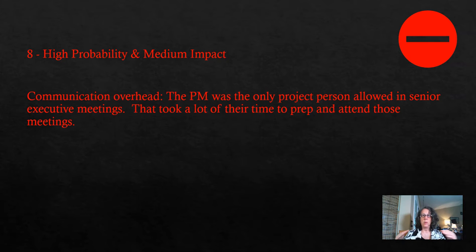And again, here's where there's some intersectionality amongst the risks, where they're compounding on each other. So there were no project management processes. There was a project manager with no project management experience and a single point of contact, the inexperienced person who was going into the executive sessions, was the only person there, and was assigned to communicate what was going on with the project, and also to bring back whatever guidance or feedback was coming from the senior executives. And so that single point of failure certainly was a risk for the project.